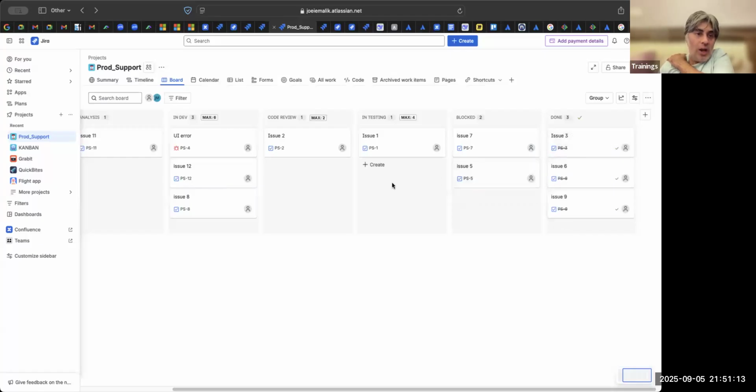So let us say if I had not put this limit here, my throughput was only 1. Even though testers were still testing, developers were still developing, code reviews were happening, people were doing work. You cannot question people. Developers were doing it, QAs were doing it, but the flow was not managed. So ultimately, instead of 3 tickets, only 1 ticket was getting done. Now it is 3. Then in the next week, again, we will see this and optimize it.